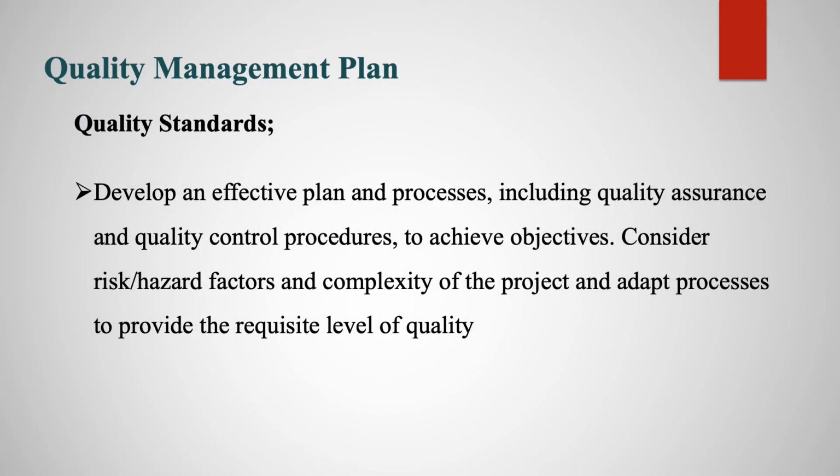and finally in this slide we're going to see the quality management plan. Every project we have to maintain a log and a quality management plan. Okay, so in the quality management plan, you have to set the quality standard. Okay, so what is the quality standard? Develop an effective plan and process, including quality assurance of the product and quality control procedures to achieve objectives. So consider the risk, hazard factors, and complexity of the project, and adapt the process to provide the requisite level of quality.